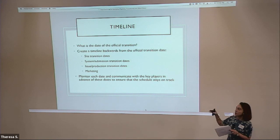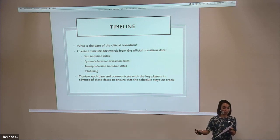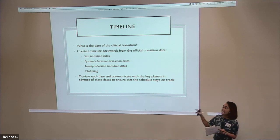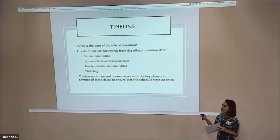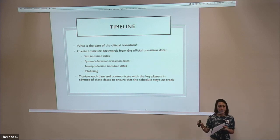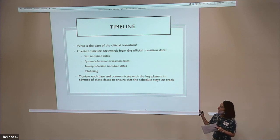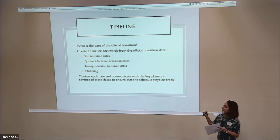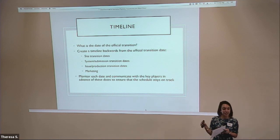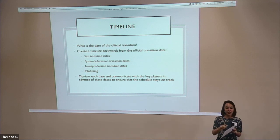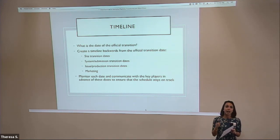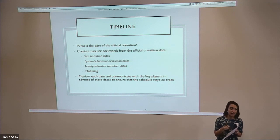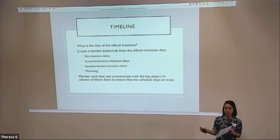Once you have that official transition date, I would recommend creating a timeline backwards from that date of all the transition dates you need to hit. Site transition dates can be really important — we'll go into that in more depth. Submission system transition dates, and your issue and production transition dates are also really important. At what point will accepted papers from the old publisher start moving to the new publisher?